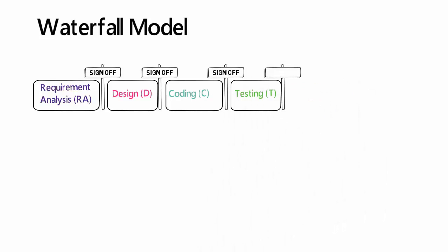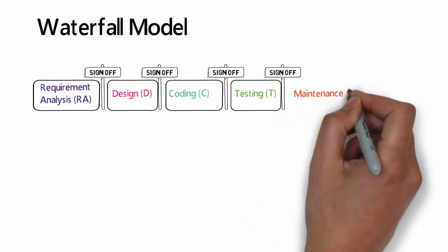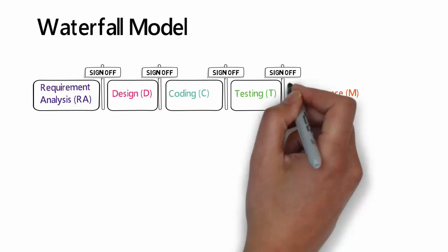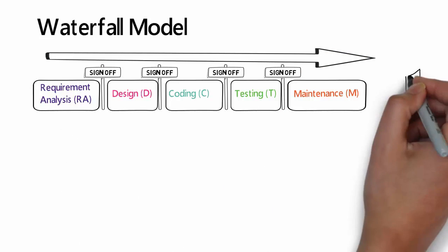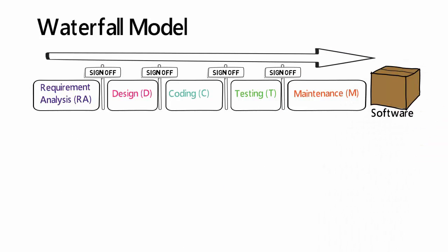There will be multiple levels of testing, which include QA, user acceptance test, etc. Once the testing is over and customer is satisfied, there will be a formal sign-off to deploy it in production. At the completion of all these phases, customer will get the software for use. It is a long wait, and the option to change the requirement based on business changes are very expensive.